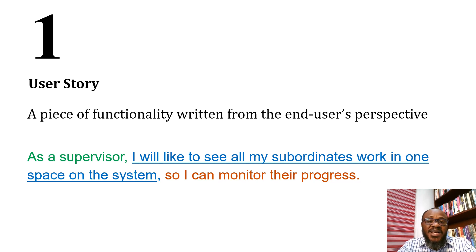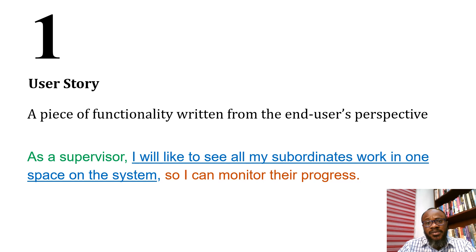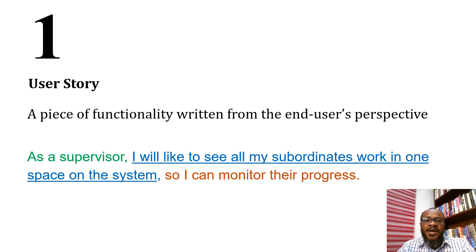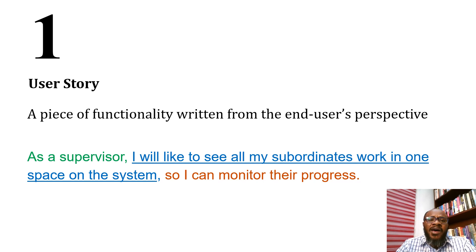A user story typically includes an acceptance criteria, so that once the goal is established we can test it against that criteria. It must be estimable and testable. One rule with user stories is that they should be completed in no more than three days. If a user story will require more than three days, it's too big — you need to split it up.